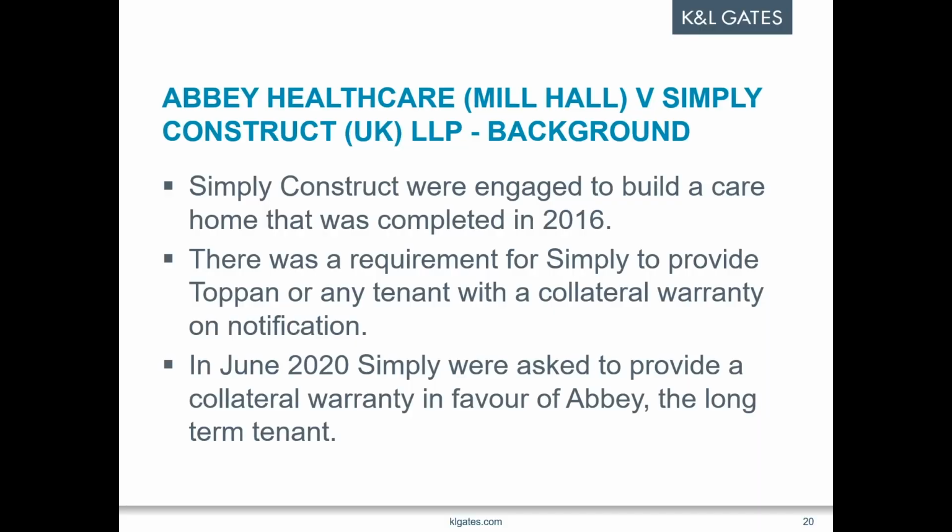And in this particular case, Topham Holdings and Abbey Healthcare, Simply Construct had been engaged actually under a JCT, I'm not sure if we're allowed to mention JCT, it was JCT Design and Build, not an NEC contract, probably where I went wrong. So they were engaged to build a care home that was completed in 2016, and Simply Construct, the contractor, were required under that contract to provide the freeholder, Topham Holdings, and any tenant with a collateral warranty upon being provided with notice by the employer.